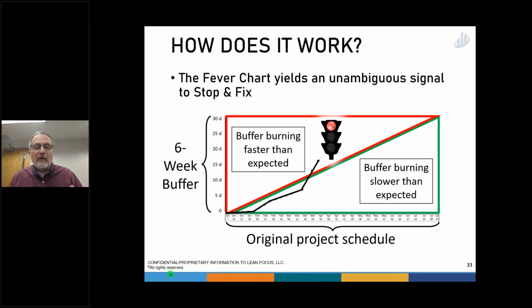You just draw a box. The width of it is the full project. Do you guys see how that project goes out right out here to July 12th? So that's the end of the project. The top is that 30 days of buffer. You remember how we squeezed out 30 days? That's the vertical. And now what we do is maybe every day, every other day, we meet as a team. We talk for 10 minutes. How is this going? Is that on time? Oh, we lost a day. Oh, bam, we lost a day of buffer, and we show it as a small black dot.